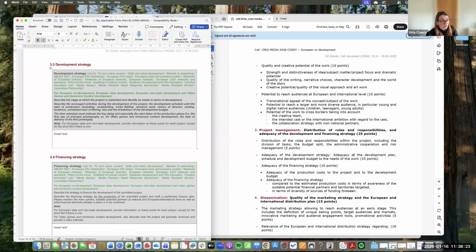The time schedule must include key dates and especially the start date of the production phase, which is at earliest Christmas Day next year, or for video. Okay, so that's the first day of principal. So this is everything right up to the first day of principal. It's pre-production. It's everything from the date you apply right up to the first day of principal. You put it in here. Okay, so you put it month by month.